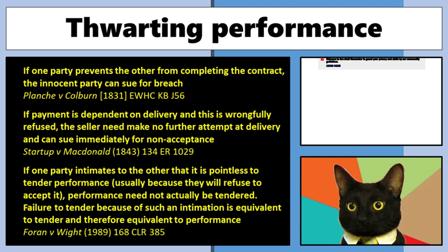Sure, there are evidential problems that you have to overcome as well, but fundamentally, all contracts have this implied term that you're not going to try and stop the other side from doing what they've promised to do. You've literally entered into this contract wanting them to do it. So that's just an implied term. That applies to all contracts.